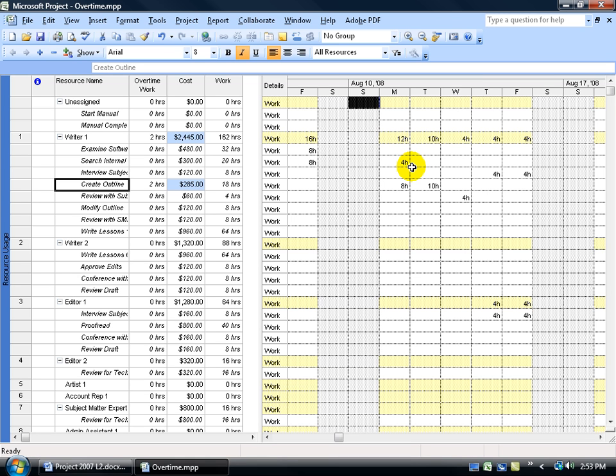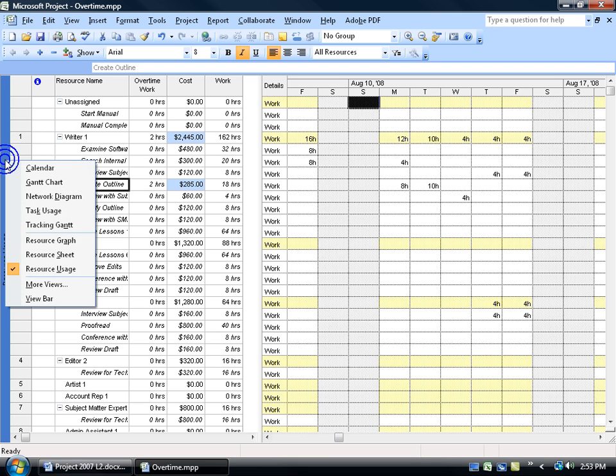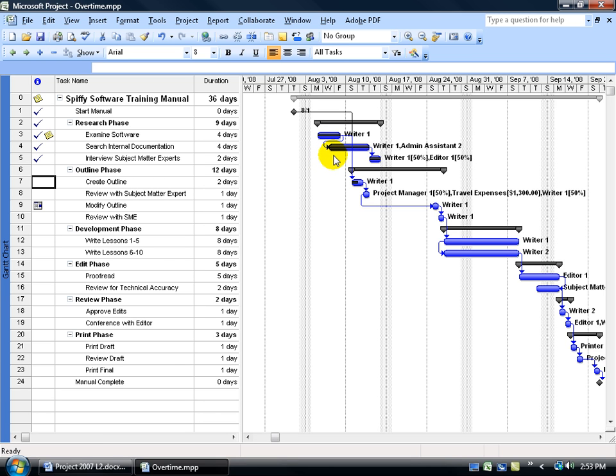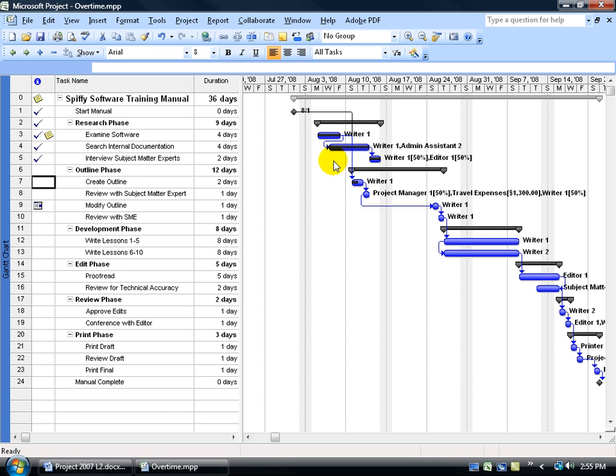You can already see some flaws in my project plan here. Let me go back to the Gantt chart. You can see that Rider 1 is assigned to all these tasks. And he started earlier on this task, which means he's working on both tasks at the same time. Which means he can only work one 8 hour a day, so this other task he's working 8 hours on would be considered overtime. Hopefully by this example you can keep this in mind when you're setting up your own project, that when you have any overlapping tasks like this, they're going to be over allocated here.